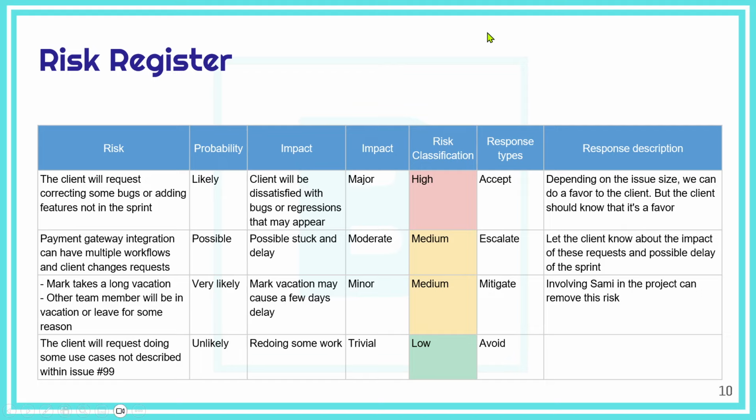And then the score of the risk, and we talked about the threshold. If the risk score is above the threshold, then it goes into further analysis for the contingency reserve. And if the risk score is below the threshold, then it just stays for monitoring. Actually, we explained that in the session. We even shared the template, not this one, but the template you have, which we have shared with you to use at your work.